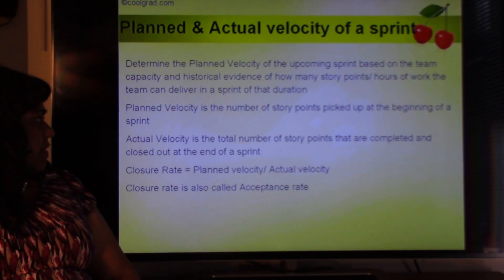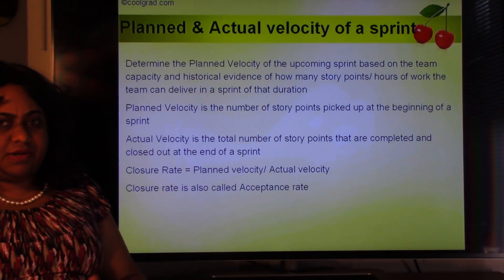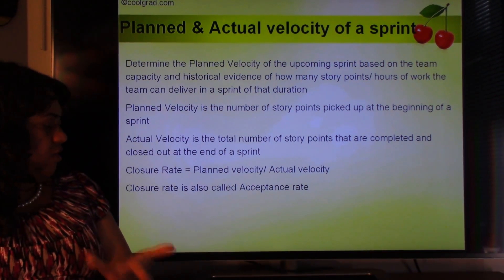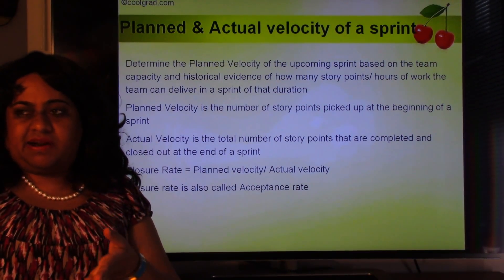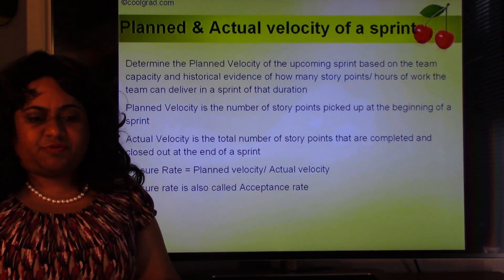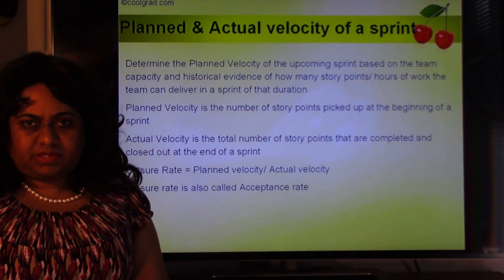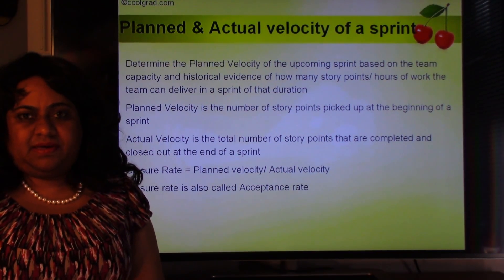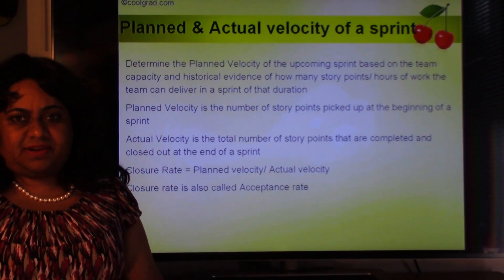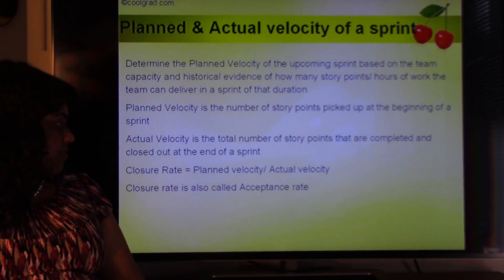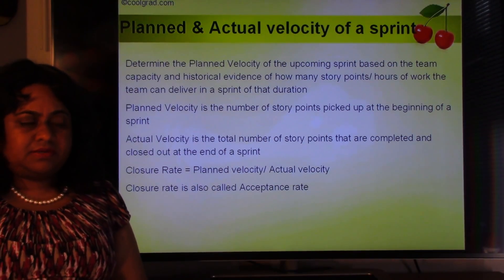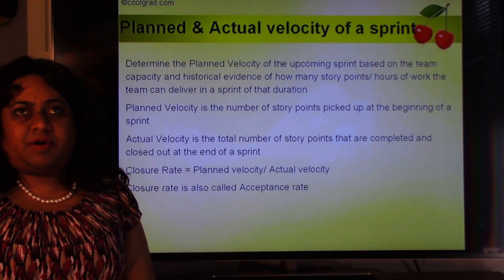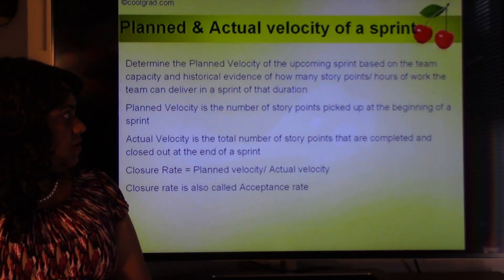Planned velocity is the number of story points picked up at the beginning of the sprint. Actual velocity is the total number of story points completed and closed at the end of the sprint. Suppose you picked up 600 hours but could only close out 500 hours — the other 100 hours belong to two user stories with major defects that weren't fully done. So 500 divided by 600 is the closure rate — actual velocity divided by planned velocity — approximately 83%. The closure rate is also called the acceptance rate.